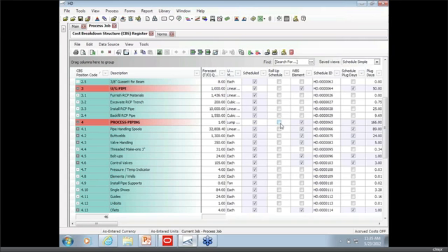Applying a generic pipe fitter resource, but then for a specific job, let's say it's in Africa, you want to switch out that pipe fitter resource with one that's specific to that region. Well, we can easily go to our swap resource button up top and specify I want to switch this generic pipe fitter with my pipe fitter in Africa, and it will instantly update the estimate. Fantastic.